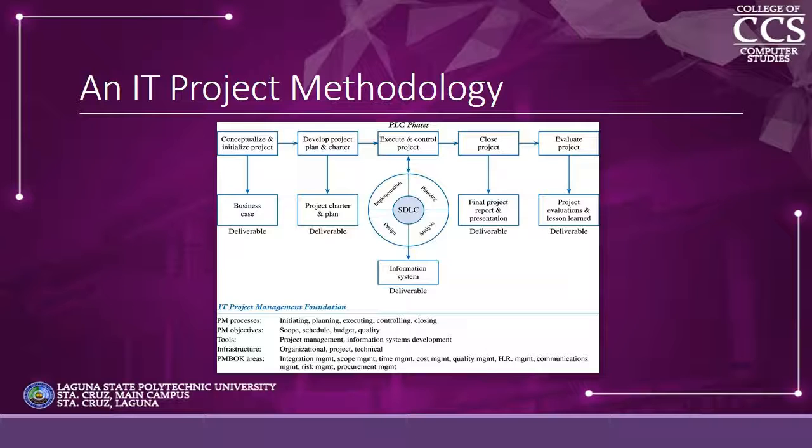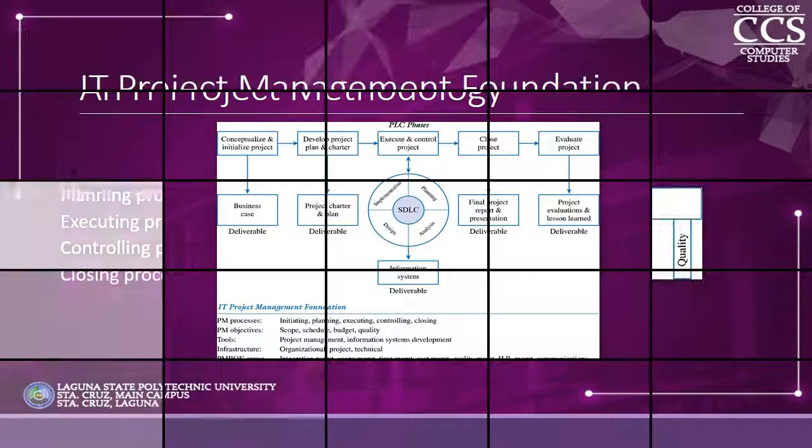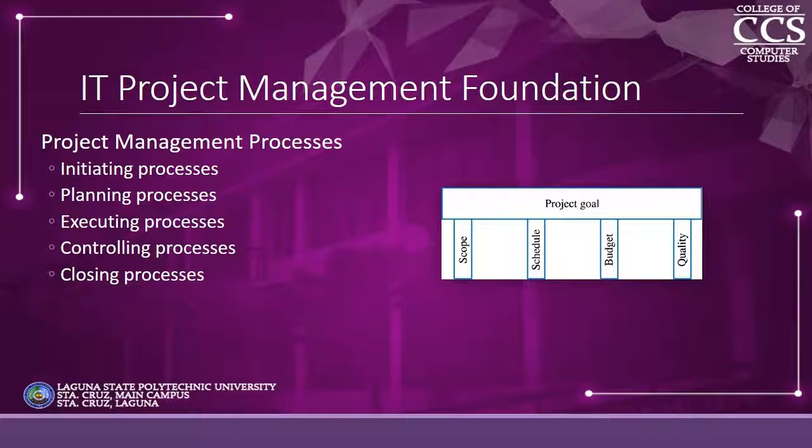Phase 5. Evaluate project success by means of the following: post-mortem by the project manager and team of the entire project, evaluation of team members by project managers, and outside evaluation of the project leader and team members. Evaluate the project's organizational value.